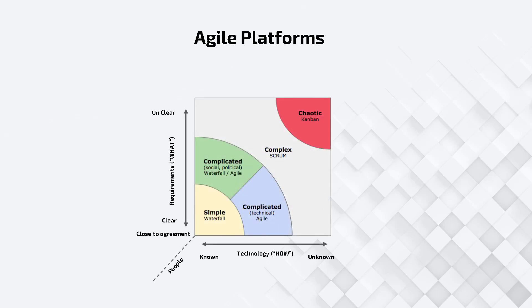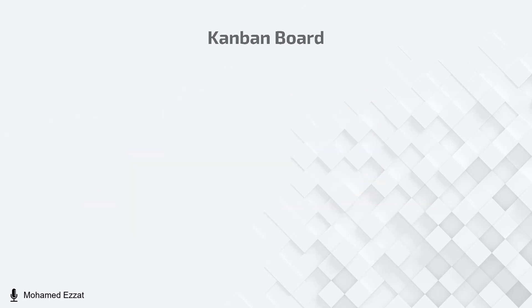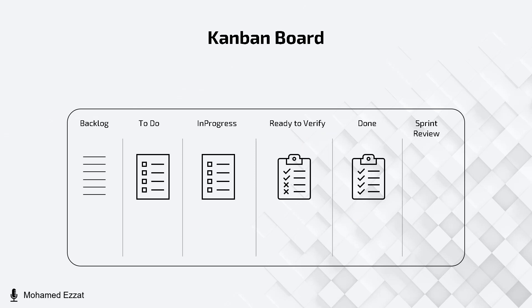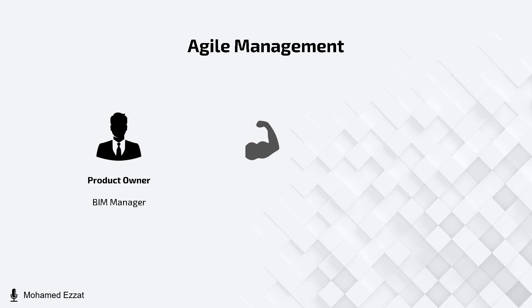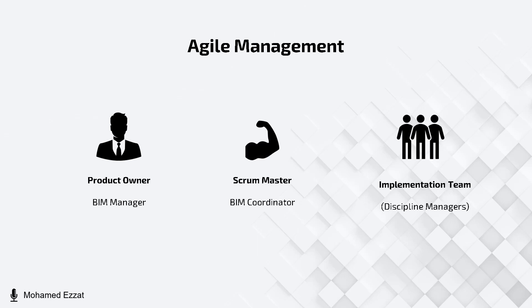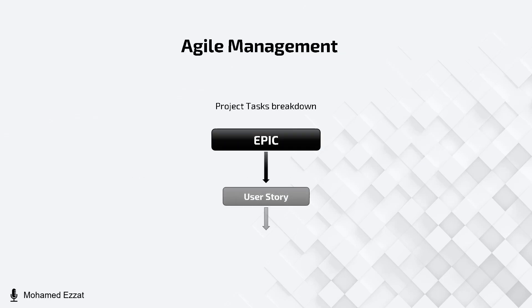We applied agile methodology in our project using the Scrum framework and Kanban board, based on the complexity and uncertainty of the project. The BIM Manager played the role of product owner, the BIM Coordinator played the role of Scrum Master, and the discipline managers were the team. Project task breakdown was divided into epics, user stories, and user activities, with user activities prioritized based on the MoSCoW rule.